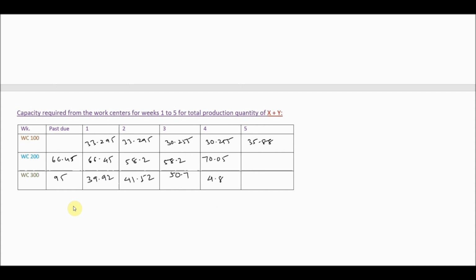However, the decision should be made based on the level of detail needed and the amount of information that is available. The overall factors method provides less accurate output, but at the same time needs very little information, while the resource profile method requires a lot of information and gives better accuracy.